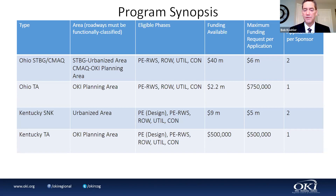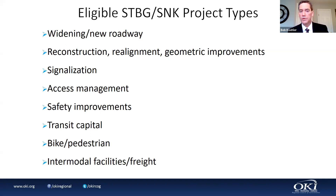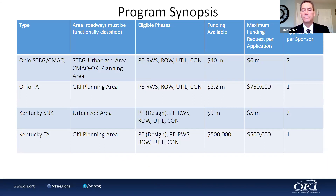A question came in: will these funding amounts increase if federal infrastructure stimulus is passed? We have not seen that there will be highway or transit dollars in any stimulus — Congress is likely pushing toward a new highway bill, so I kind of doubt it, but all things are possible. On PERWS: PE is design, PERWS is right-of-way services. You can't yet get permission for right-of-way purchases, but you can do the groundwork with PE money.